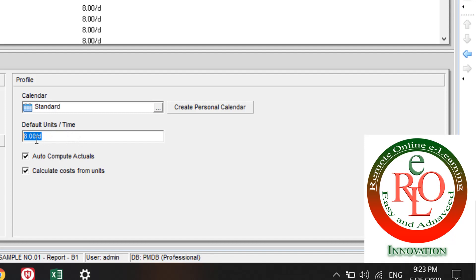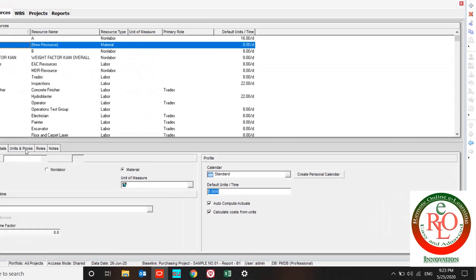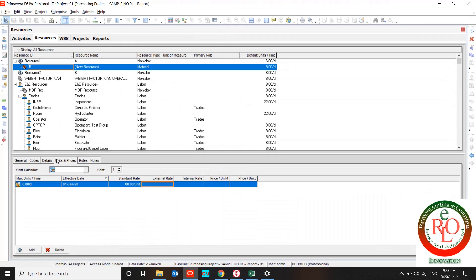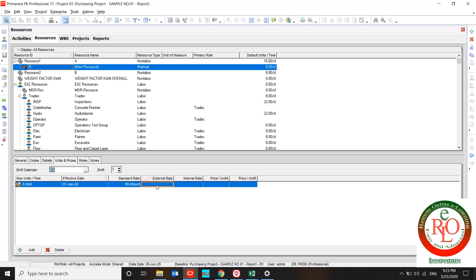And what is the unit price for the resource? You can define what is the effective date of your resource, the standard rate of resource price, the external rate of resource price, internal rate of resource price, and two other prices over here. We can rename them by admin tab.